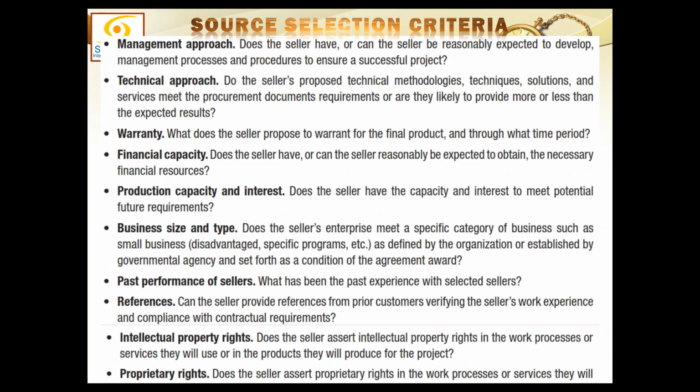Moreover, what is their management approach? Some points for that. What is their technical approach? Are they giving any warranties? What is their financial capacity? What is the production capacity and interest? Business size and type of the contractor? Past performance of the seller? Any references?